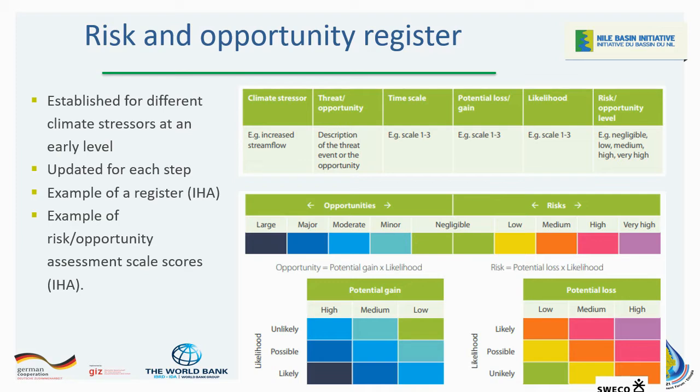And this is very important because at this level, you must involve the stakeholders to determine what level of risk they think might require treatment and what level of risk they feel they can take forward and maybe monitor and find solutions as the project goes on. It may not always be possible to find treatments for all the risks, maybe because of economic or other limitations, or the stakeholders might decide that at some point in future they'll just build in a mechanism to deal with a particular risk.